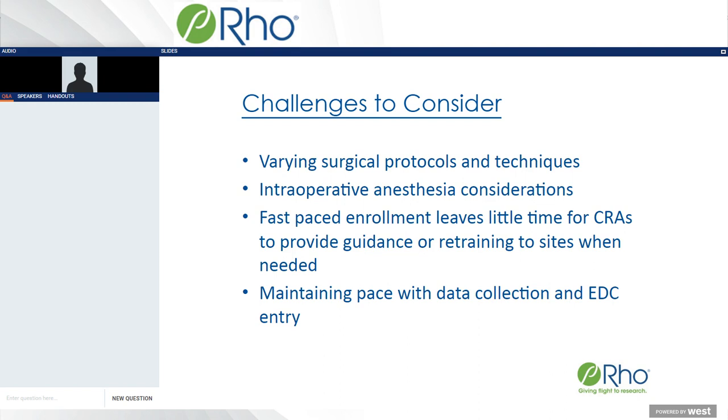As we discussed with the monitoring, it really does leave very little time for your CRAs to have impact that can provide guidance or retraining when they arrive on site. Once the first subjects are enrolled, if you're enrolling 14 subjects in a week, by the time the monitor shows up on site, there's already maybe 14 or more casebooks waiting for their review, which is a lot to get through, particularly for the very first visit. So that presents a really big challenge.